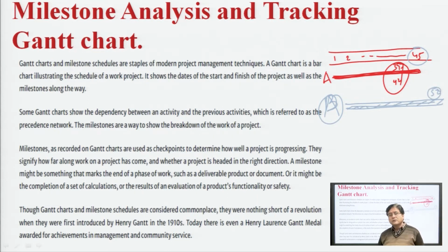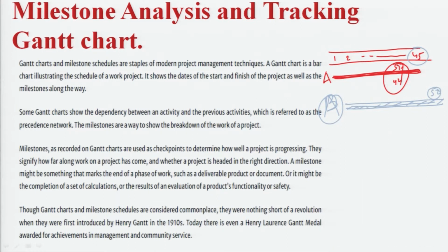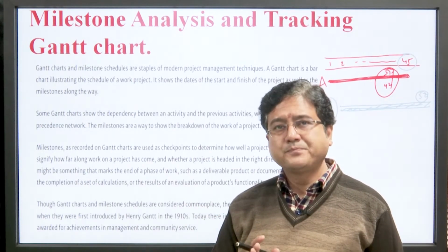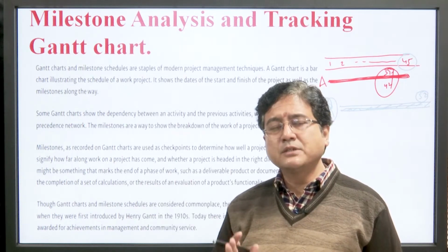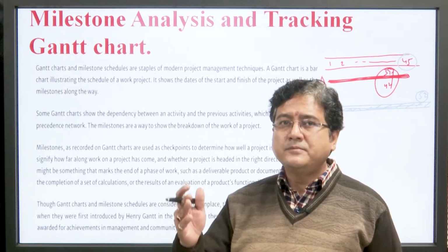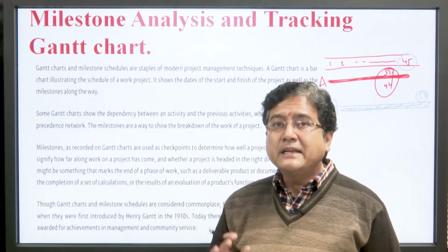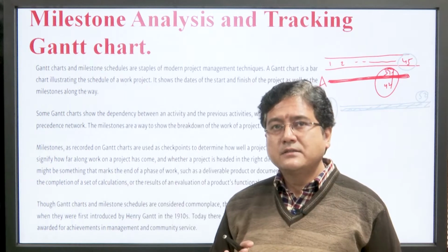Then we are not able to achieve the milestone. We say we are delaying the milestone. So, at that time a project manager has to take the necessary steps to control things. This is a delay of only about 7 days. If the project manager plans the next task properly, he can manage and utilize these 7 days.